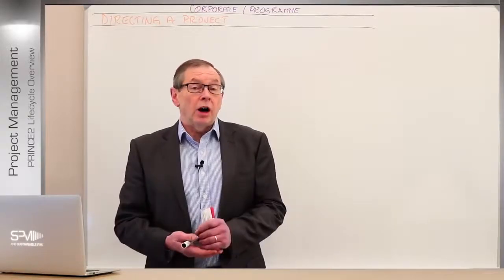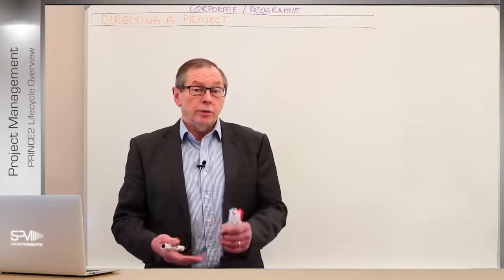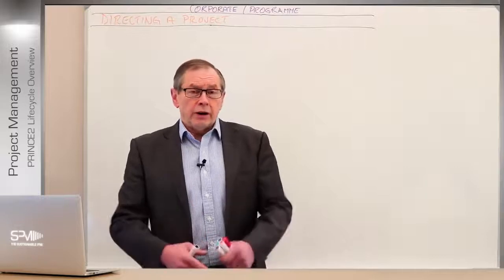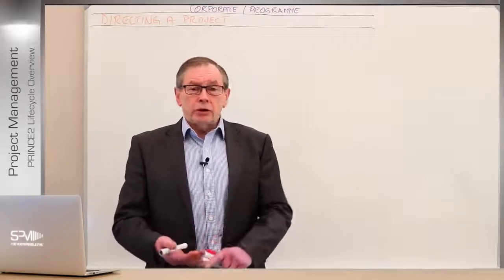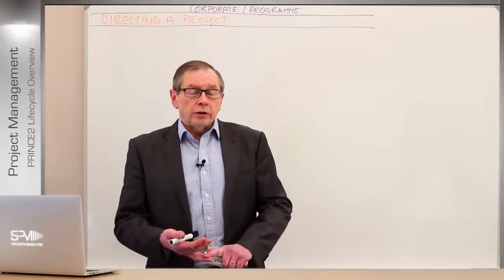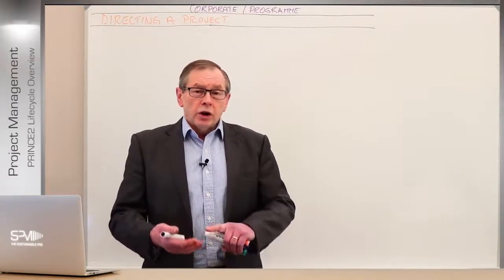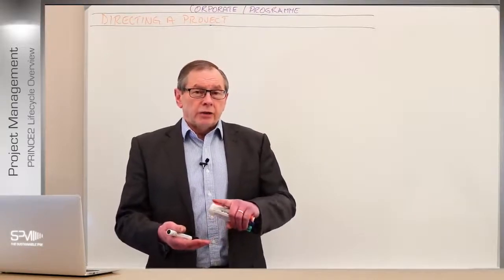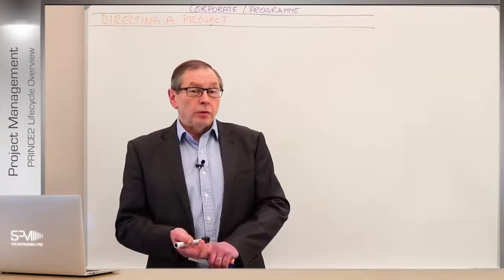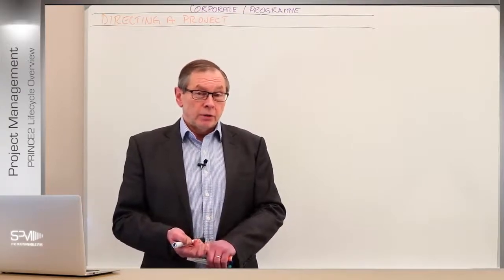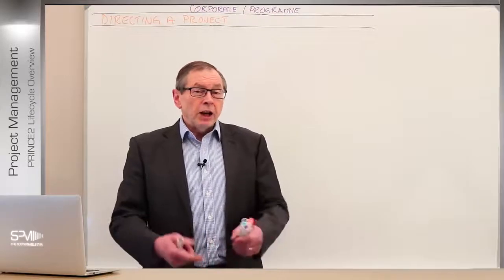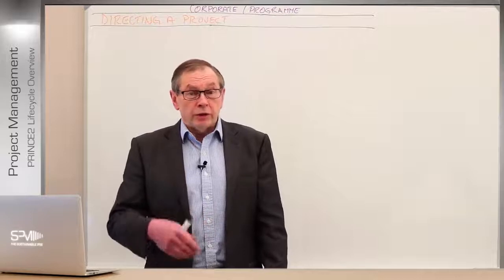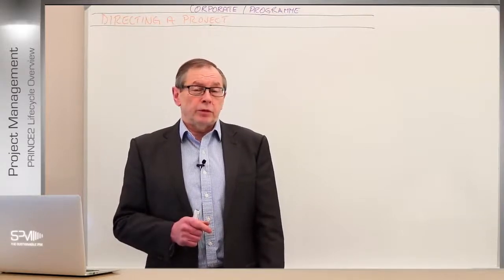We put a lot more detail behind the project. Initiating a project is a process, but it's also a stage now because there's a lot of work going on. We've gone through all that, put the plan, understood how we're going to handle certain aspects like risk and quality, etc. Finalized the details of the organization, controls, benefits review plan, and looked at the approach we're going to take, how we're going to build the solution from here onwards, right? Which they call the project approach. And then finally, put in a plan for the next stage. And what we're really doing is the very first part of the delivery aspect of the project.